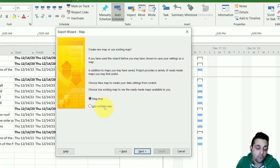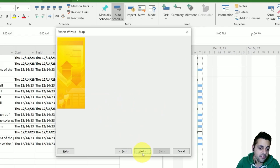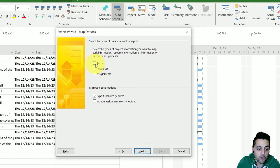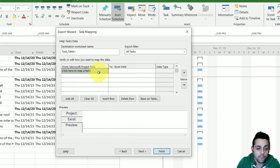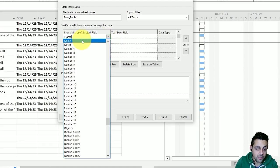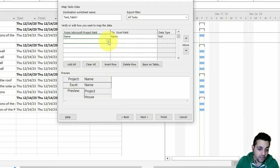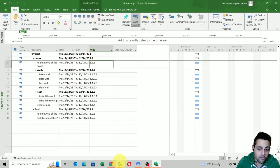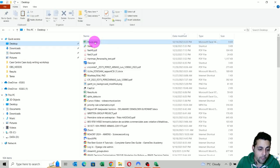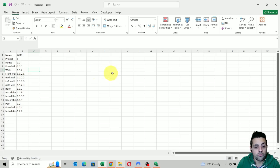We'll create a new map, because we don't have any pre-existing map. Here we're going to start establishing and clicking on the different categories of data that we want to export. In our case, we want to export the activity names and the work breakdown structure level, which belong to the task category. So we click on Task, click Next, and now we choose what we want — the name of the activity — so we search for name. We add a new column for WBS, select WBS, and we have both the name of the activity and the work breakdown structure level. So we click Finish, and now on the desktop we have our new house Excel file with the requested data.